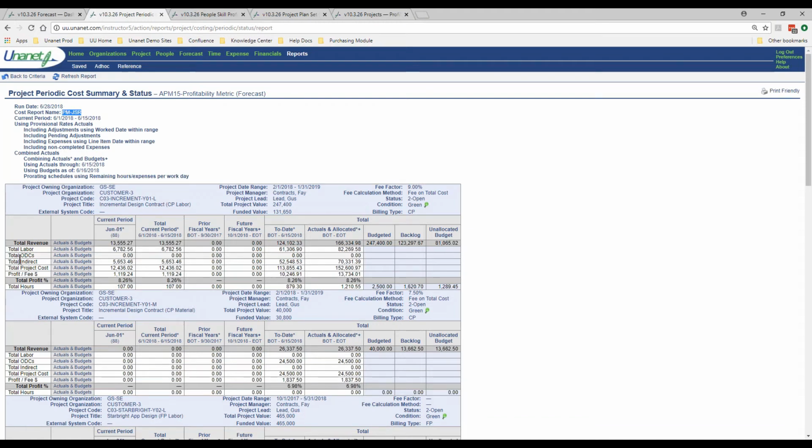As you notice, these are the only fields that I'm looking at. There's a lot of data on this report, but if I'm teaching a brand new project manager what to look for and they run this report, step 1 is you look at this field right here and you decide if that number is within corporate threshold. I told you to execute within 2 to 3% of plan, and maybe the plan, well, what was the plan? I don't know, let's go see.